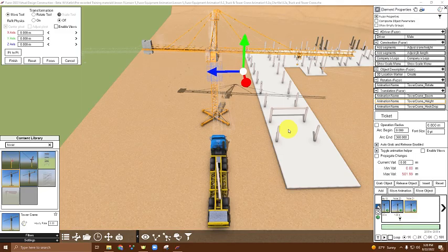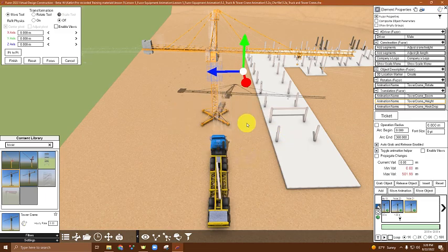The second issue is that of the total length of the animation. We are going to be putting both vehicle animations into the same equipment task. That means they will last the same length of time. Since currently, our truck animation is shorter than our crane animation, the truck will slow down its animation to fill out the length of time. So the easiest thing to do is make sure that the total time is the same.